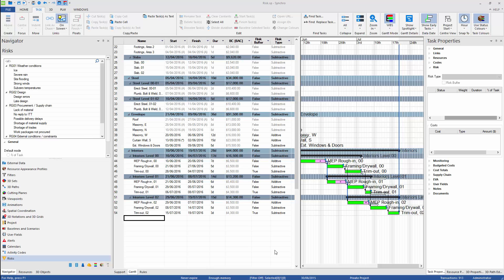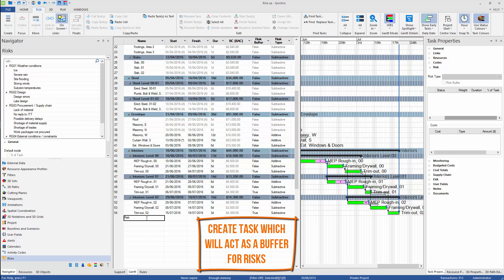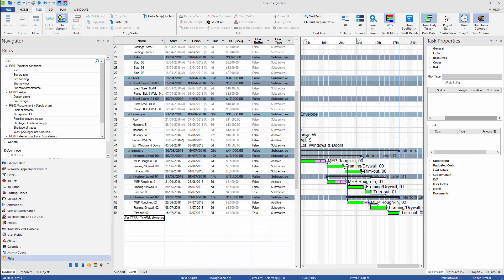Buffering risks is a technique which allows to move identified risks to specially designated task or group of tasks if we want to keep the logic and duration intact.